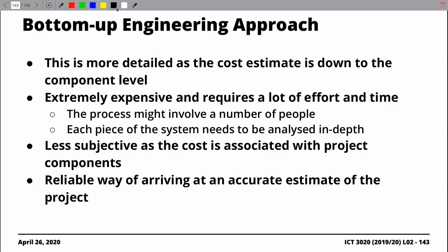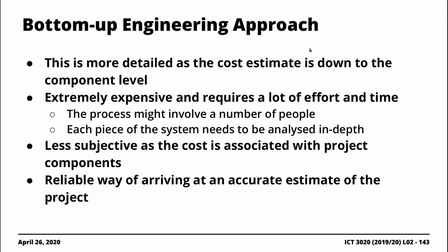All right, so in terms of the bottom-up or the engineering-based approach here, like I said, it's slightly more detailed because what you're doing is you're taking a bottom-up approach where you're breaking up the entire project into smaller components that are associated with the project. But obviously, because you're breaking it up into smaller components, a lot of effort will typically be required for you to come up with approximate costs and schedules associated with those smaller components.